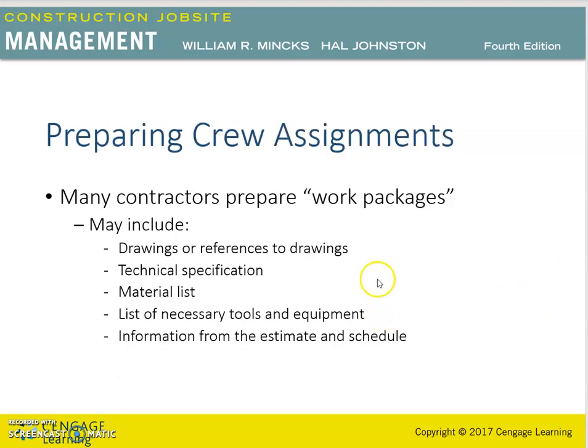The next thing in which the construction documents may help is in preparing the crew assignments. Many contractors prepare work packages or crew packages to enable the crew to accomplish a task.